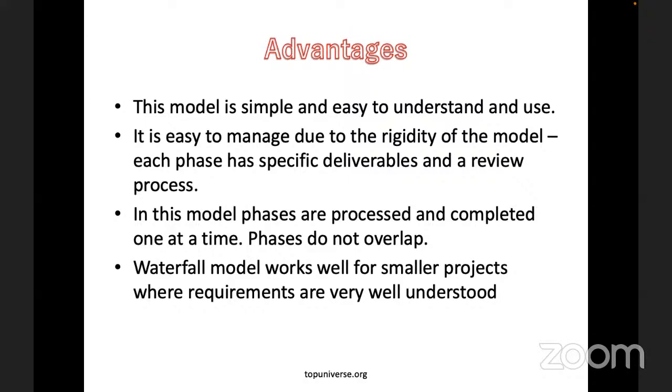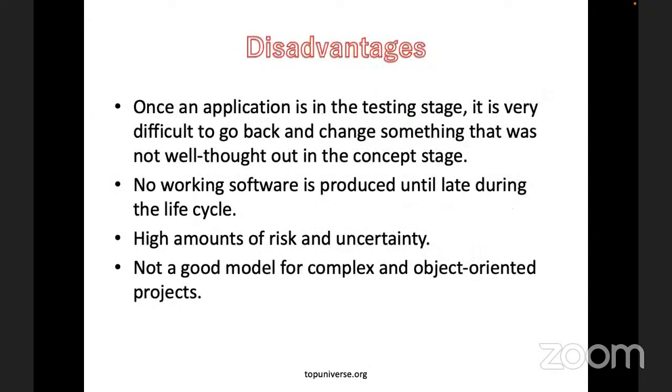So let's look at some of the disadvantages clearly. Now, once an application is in the testing stage, it is very difficult to go back, just like I said, and change something that was not well thought out in the concept stage. Okay. Another one, no working software is produced until late during the life cycle. Also, there is a high amount of risk and uncertainty, and it is not a good model for complex and object-oriented projects.